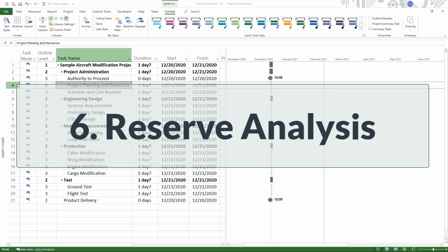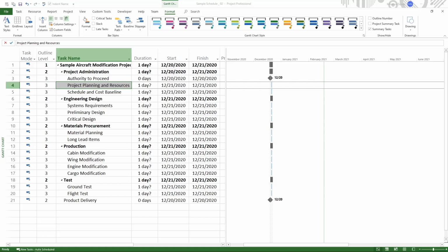Lastly, we have reserve analysis. This is where we know that we have risk for certain tasks. We then keep a management reserve of money to be able to take care of issues to tasks because we know that each project will have some type of problem come up no matter how much we plan. Now that we know a little bit more about coming up with task durations and had our team make the decisions on this, we can go ahead and enter these durations into our schedule.